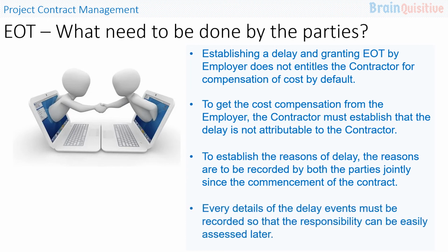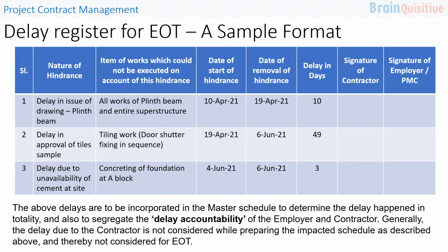Every detail of the delay events must be recorded so that the responsibility for the delay can be easily determined at a later stage. Here is a sample format of a delay register, which is required for extension of time.